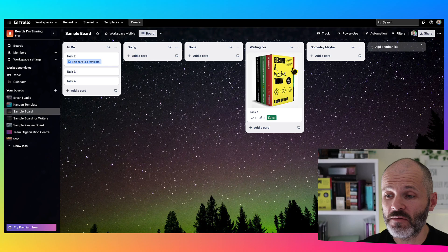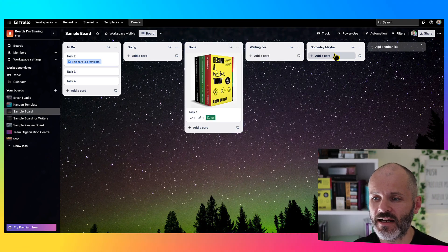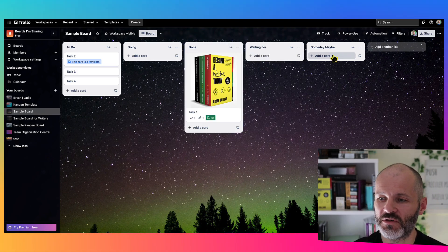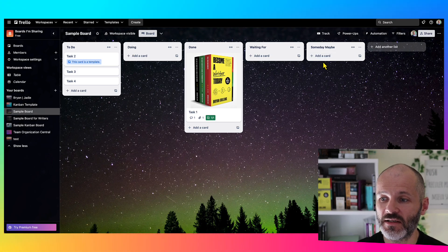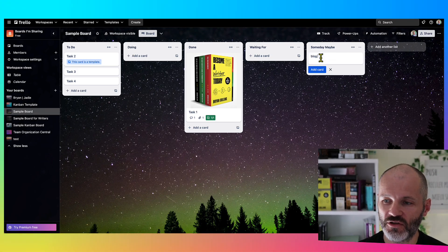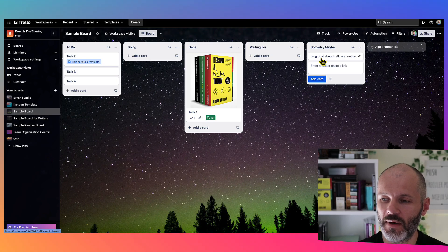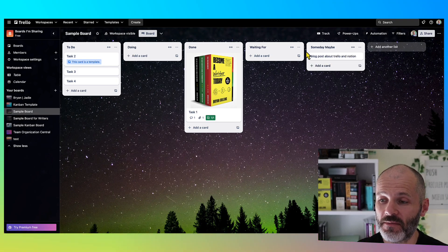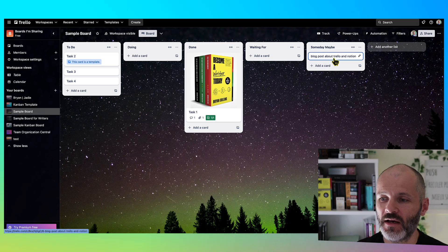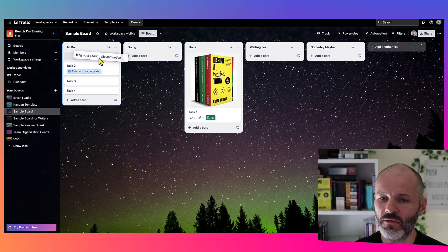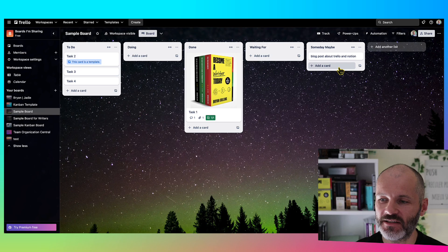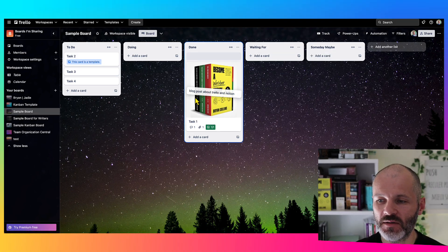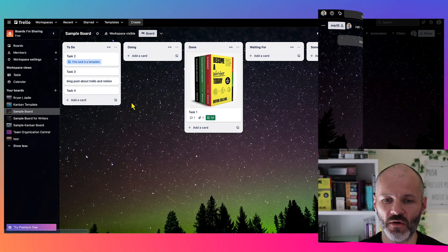And as for Someday Maybe, sometimes I'll add items that I may potentially work on, but I don't have time or energy resources to do at the moment. So as an example, let's say I wanted to write a blog post about using Trello and Notion. My thesis is I could get some traffic from that blog post, but perhaps it's not relevant. I'm not really sure, but I don't want to lose track of the idea. Well, rather than having it in the To Do column, I'll simply drag it to Someday Maybe, and then at some point they can always pull it back and put it into my production workflow.